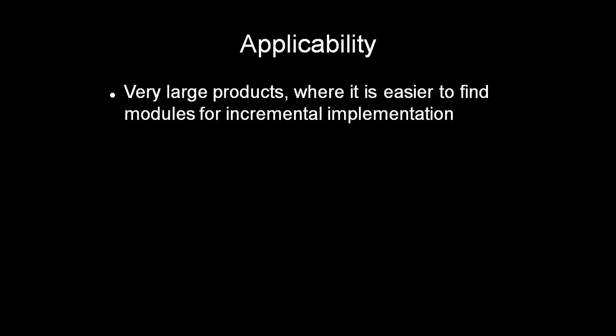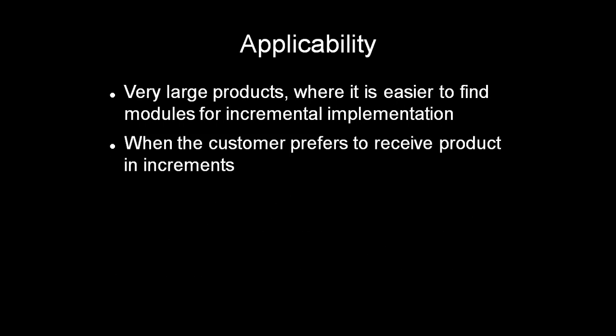The applicability of this evolutionary development model: it can be used for very large projects where it is easier to find modules for incremental implementation. So it is suitable for very large projects where we can identify the different modules for incremental implementation. Then when the customer prefers to receive the product in increments, we can go for this model. And another applicability is in object-oriented development. If you are using an object-oriented approach, then we can go for this evolutionary model.